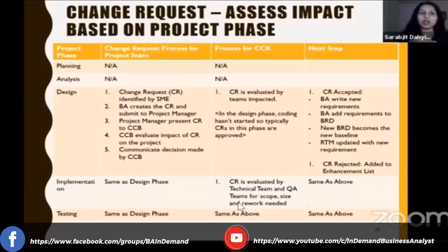Yes. So your SMEs are people that are giving you the requirements. At the onset of the project, you identify who all is impacted by the project. And once you identify the departments, then you go to their management and say, who from your team can I work with on these requirements? So let's say when you start a project, you have 5 departments that are impacted. From each department, you will get 1 or 2 people to be your subject matter expert.